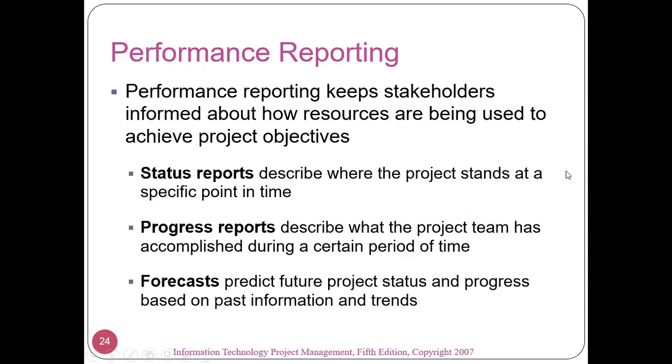So, performance reporting keeps stakeholders informed about how resources are being used to achieve project objectives. Work performance information and measurements, forecasted completion dates, quality control measurements, the project management plan, approved change requests, and deliverables are all important inputs to performance reporting.